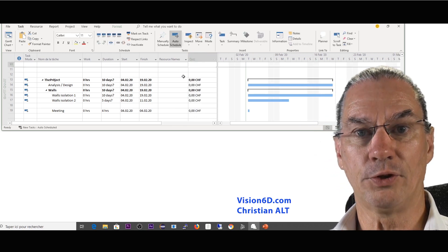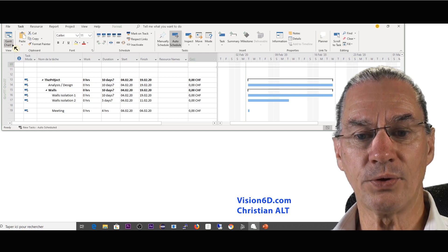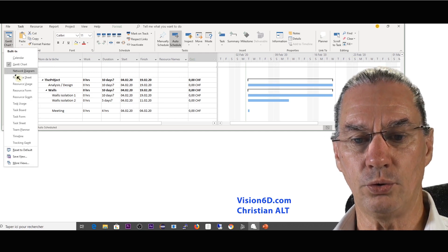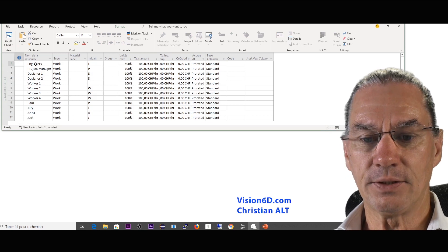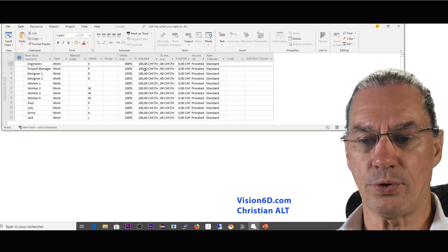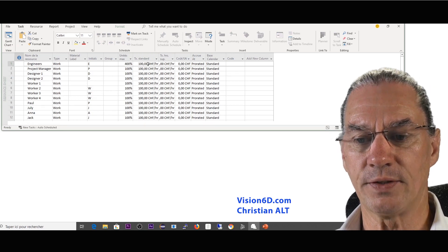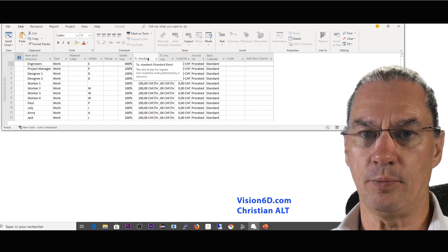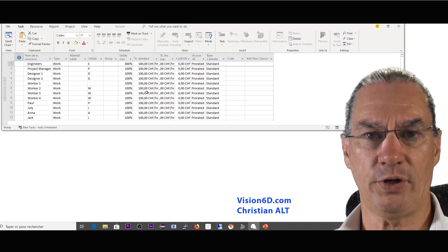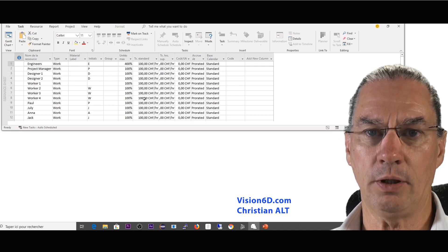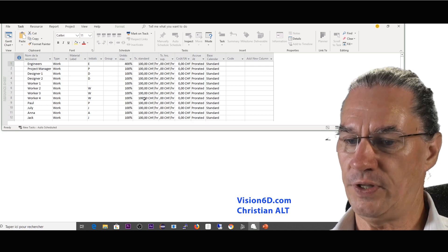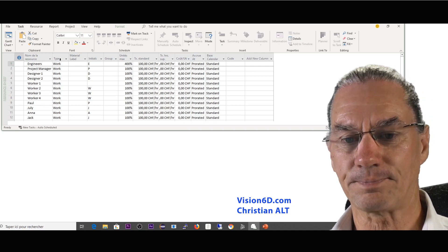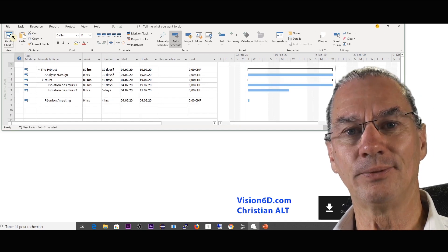So for the moment everything is at zero and I also need to go into the resource sheet and to make sure that all the resources have an hour rate. I made it really simple. I made 100 for everyone. I know that for some it's a bit low, for some it's a bit high, but it's easier for this example.